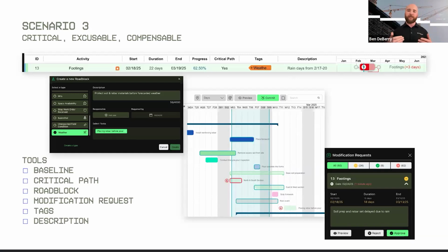That is when you and your team take a step back and say, we've got a good plan, but what could prevent it? How can we protect this plan? And so the goal there would be to list all of those issues that are still outstanding. It's a tile selection from the owner. It is a submittal approval from a design team. It is an RFI that needs to be answered, items like that.